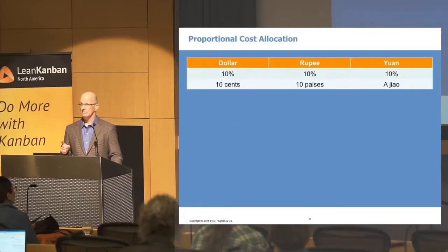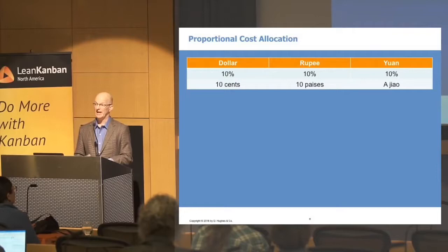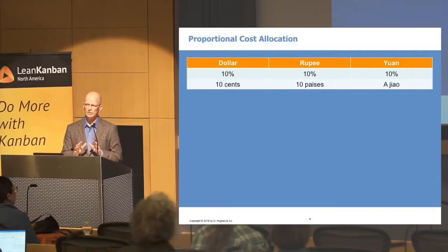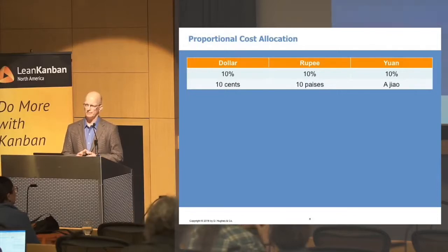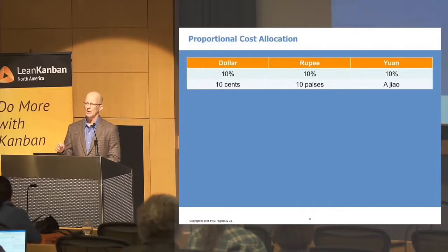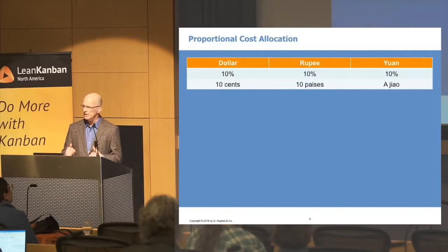The secret is cost pools. So bear with me on this. We'll spend about a half a minute on it. What matters most is that you take a look at a team as a resource group. It doesn't matter what relative sizing or relative capacity proportion mechanism they use, because you're going to normalize that within the team itself using proportional allocation based on that relative sizing or relative capacity.